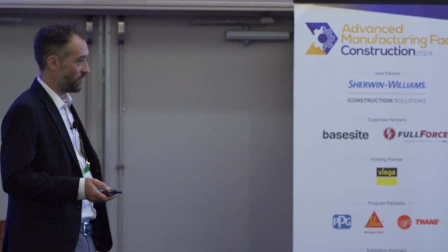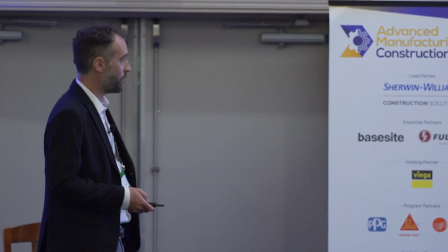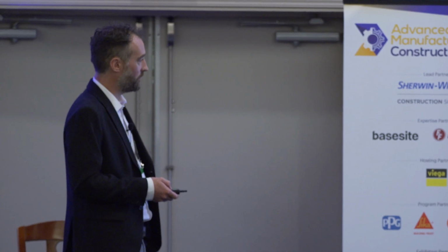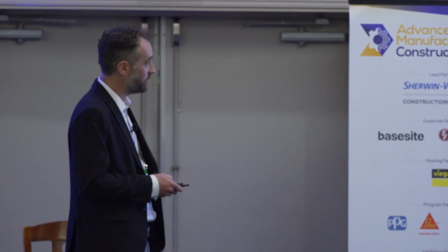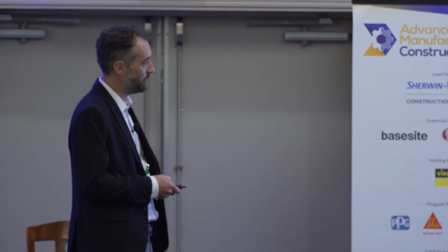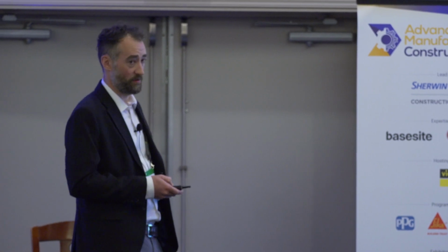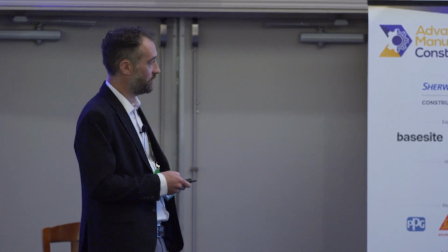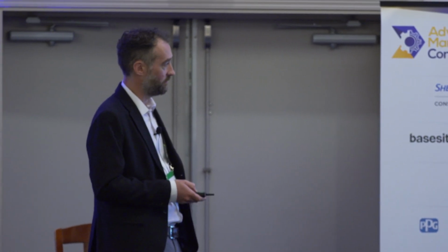Okay, cost. This is a big one. This is some data from a fab that we did in Europe, and it's a pretty big fab, as you can tell from the numbers. The baseline design had 792 electrical panels in it. When we came in and optimized it, we said, hey guys, you can connect this tool set with 534 panels. An important point to emphasize here is this is not like a balloon squeeze. It's not like you take panels out and just add more tool install cabling in. This is a reduction across the board.